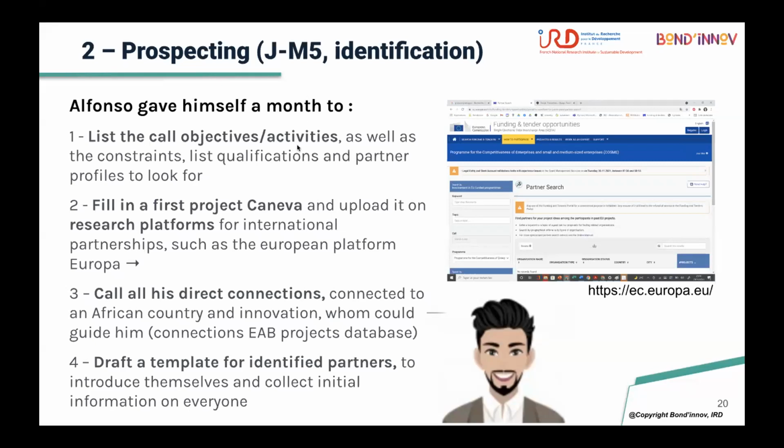So I will continue. As I said, Alfonso gave himself a month to list the core objectives and activities, as well as the constraints, and to list the qualifications and partner profiles to look for.